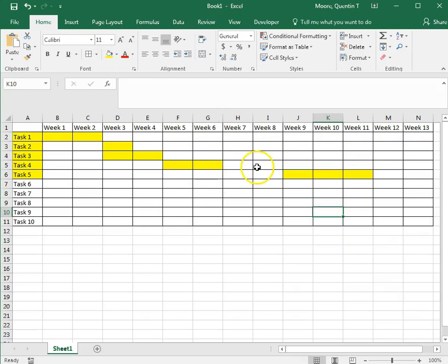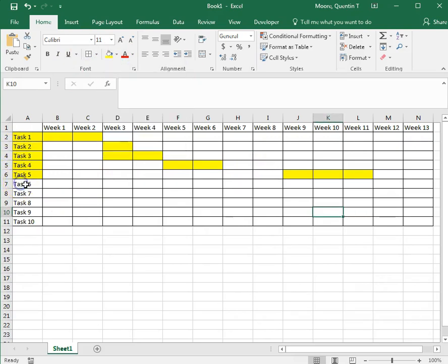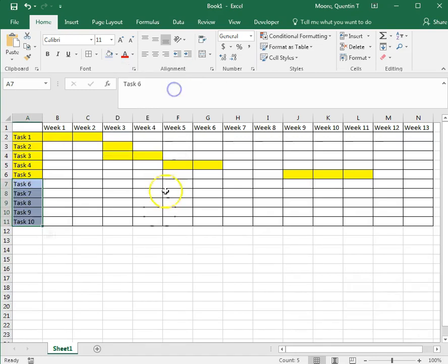So there's a little bit of a gap. But that gap is in place because of the second set of tasks. So in this case, we'll say that this belongs to a separate project, but they're going to intertwine in week 7. So we'll call this blue. We'll make it a little bit lighter so you can read it. And say that this task actually is going to begin at the end of task 4 in the previous process. And it's going to take 3 weeks to complete.